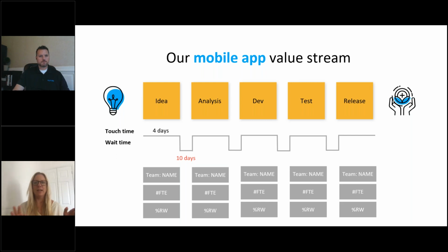And I was like, well, just hang on a minute. Maybe we should just look at what's going on before we just pile in a load of tools in the testing arena. And as you just alluded to, what was actually more of a problem was the collaboration around the requirements. So what they were getting were poorly defined requirements, not actually poorly built software. And no matter how far you shift testing left, if you've broken that part in terms of requirements definition, you've kind of got no hope, really.